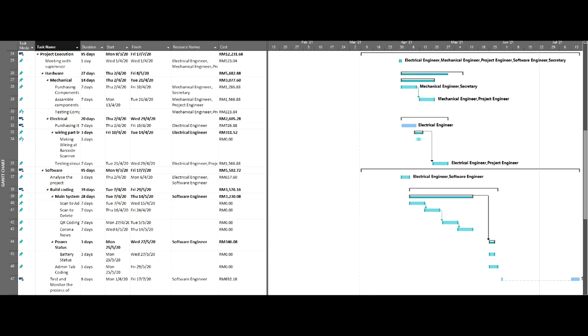After that, project execution. In this phase we have two tasks which is under hardware and software in the mechanical and electrical part. Due to the COVID-19 we only can finish up the process after purchasing the trolley and barcode scanner, the equipment and making wiring of the barcode scanner. The most long time taken to finish this stage is the software that's been done by Yusof. It takes lots of time because it has many coding such as scan to add, scan to delete, and QR coding. With that we complete this phase for almost 70 days which takes half of our process.